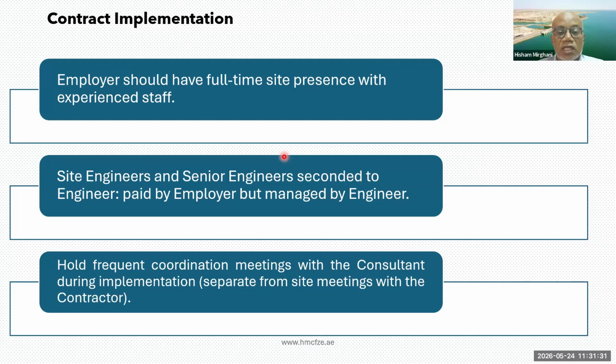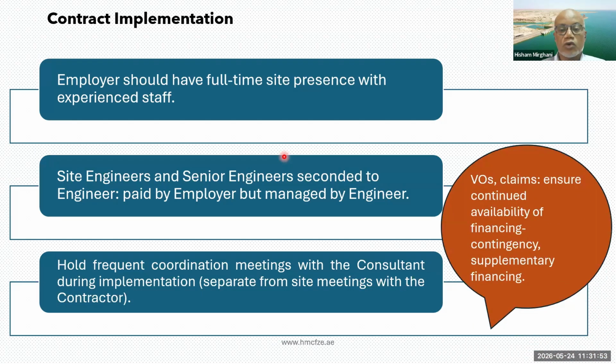This meant that we had 2 sets of engineers on the site, and we managed to build the capacity of our teams through this full-time presence on the site. And they were available because there used to be a rotation system whereby they could be taken back to the headquarters if we needed them, to work on the other projects that were ongoing in terms of investigations and designs.